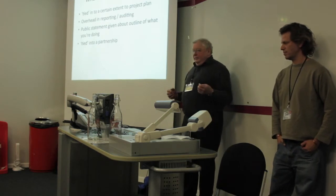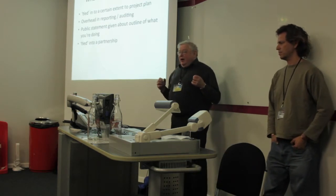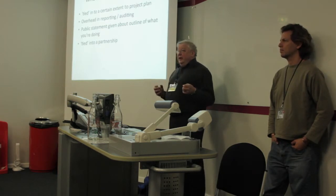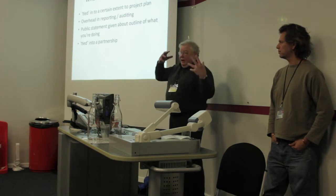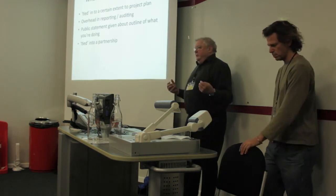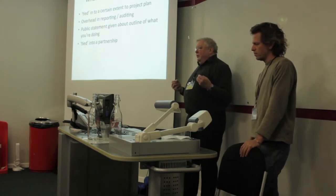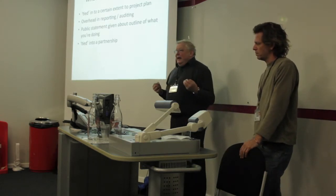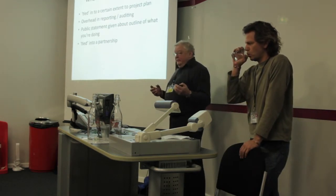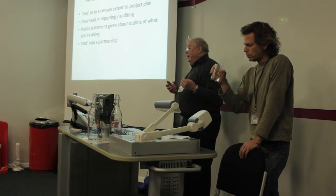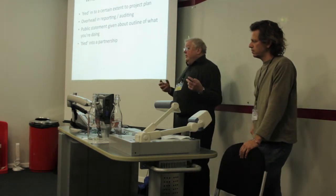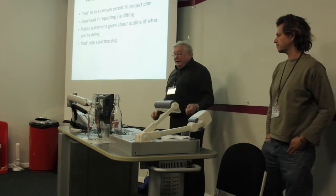What are the disadvantages? Well, to start with, you're tied in to a certain extent to a project plan. Because if you get the funding, you're committed to do this amount of work, in this direction, for this amount of money. It's not carved in stone, because no funding body wants you to carry on making white elephants after the white elephant shop has closed. But you can't just suddenly change your mind mid-project and try and do something else — not without consulting the funding body, who have got a big financial stake in this.